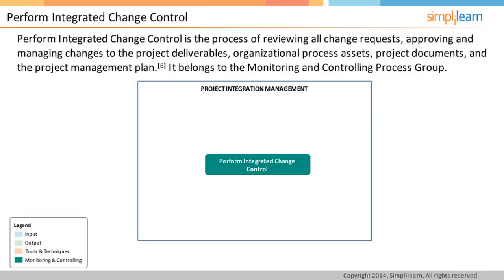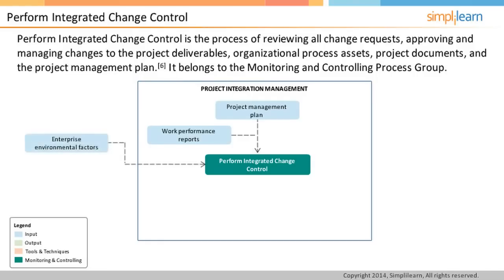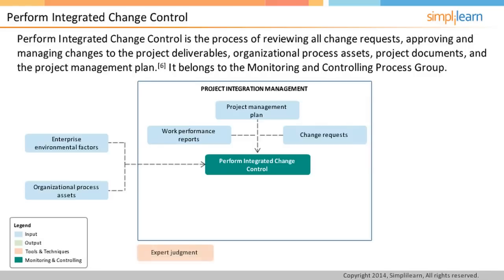The inputs to this process are similar to that of the monitor and control project work process: project management plan, work performance reports, enterprise environmental factors, and organizational process assets. The only additional input is the change requests. Another important tool and technique used in this process, along with expert judgment and meetings, is change control tools — and most important among them is the change control board.